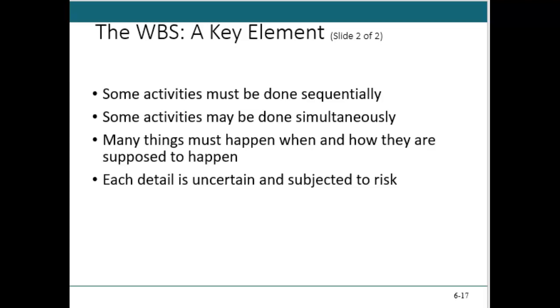When we're done with that, it ends at an item called the work package. Later we'll continue decomposing into activities. Activities form our schedule, and from the scope and the schedule, I can develop the cost pretty easily. Okay.